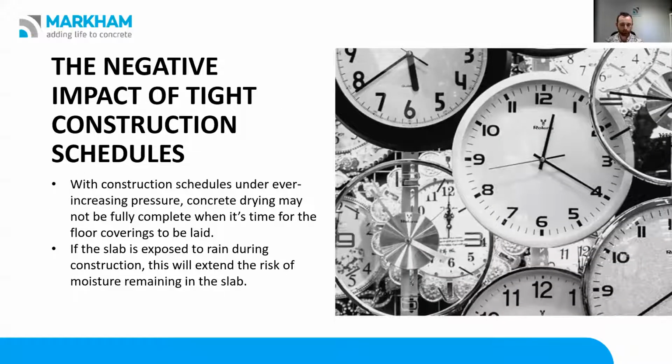So with keeping that in mind, obviously there are negative impacts associated with that. Now more than ever, projects are needing to be completed in shorter timeframes. Due to these tight deadlines, the concrete is not always completely dry when it comes time to actually lay the flooring. Another offset to that is that if you've got an exposed slab and it's wet during the construction process, that timeline actually resets. So you're always behind the clock, so to speak. It's why it's important to treat the concrete early in the project and take advantage of Acron's guaranteed moisture controlling properties that are also backed by a performance-based warranty.